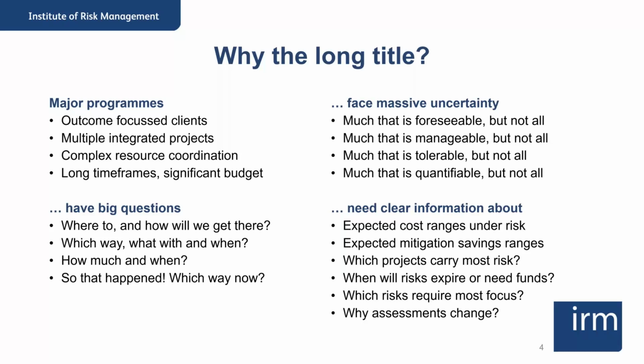But we also need to understand the timing on a big long-scale project. You very rarely need all the money up front. That AFC that we're always managing to is often a long way down the line. It's very important that we understand if it's going to change and how, but we also need to understand we've got to manage the money that we have at the moment. When are we going to need certain funds?